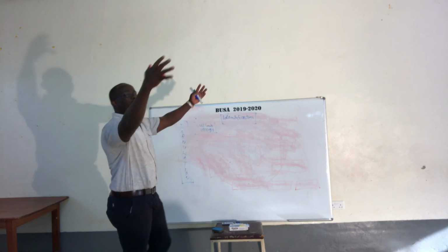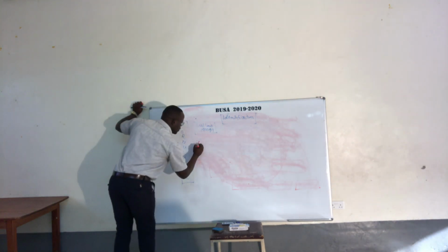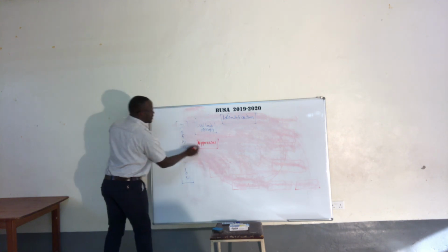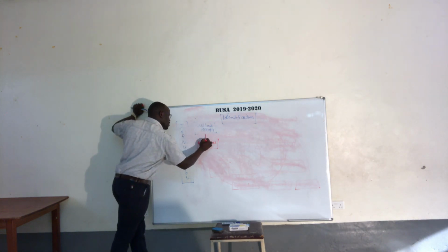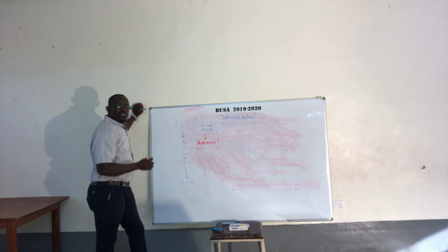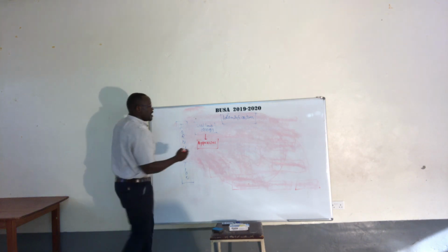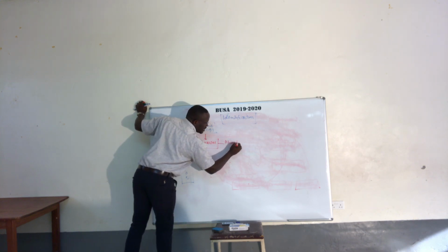When you have all that basket full of things, you come to appraisal. And what are you appraising? You are appraising what has taken place. All these issues that you have here, you start appraising them. We start giving them value, each of them. And as you give them value, you abandon what is not needed.